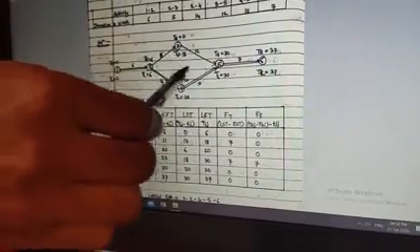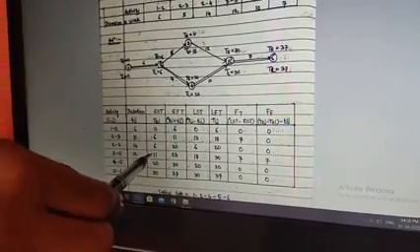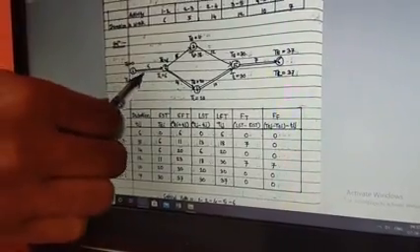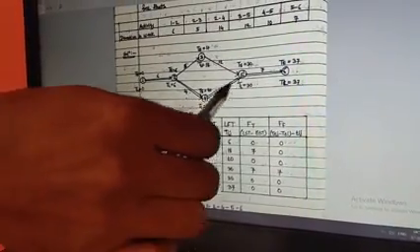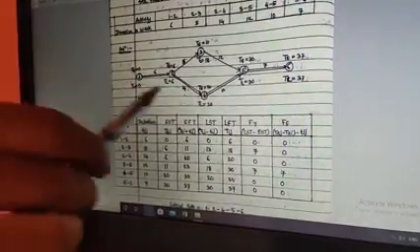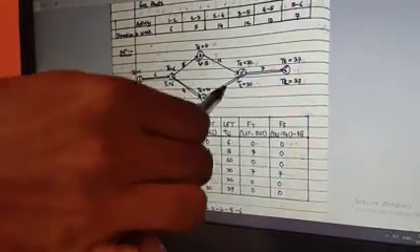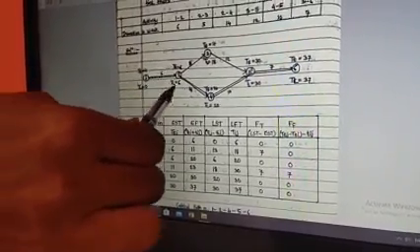That is why for the third activity, for this linkage, the minimum or early start time will be the addition of the previous 2. So then the next one is 4 to 5. So 4 to 5, the logic is again the same. If I want to go for this activity, I have to carry out the previous 2, 1 to 2 and 2 to 4.